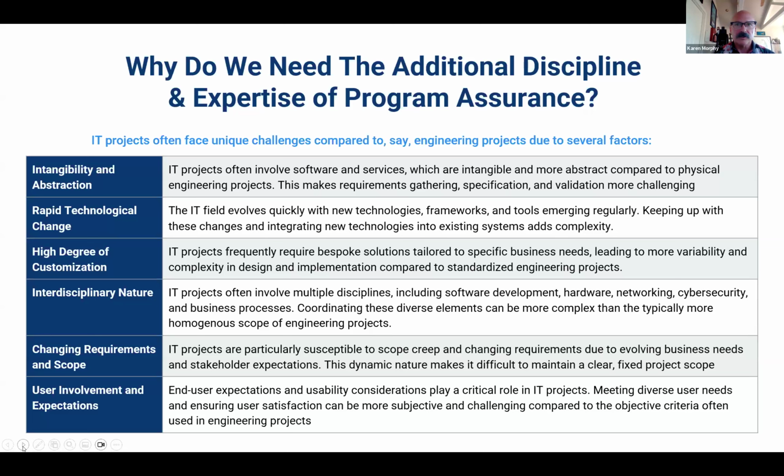And to make matters even worse, sometimes a lot of projects are set up with a contract from end to end, but this abstraction phase of requirements analysis can result in significant changes in scope, schedule, and budget, resulting in an unrealistic situation given the original schedule and budget. It may also result in a quick shift in the project's scope, schedule, and budget right out of the gate. And then that can trigger challenges to get the resources you need. So I think you get the gist of it.